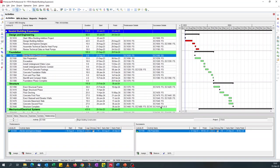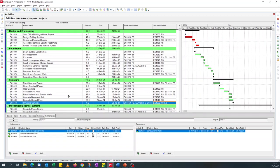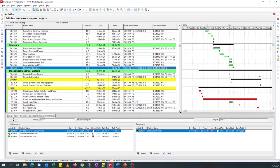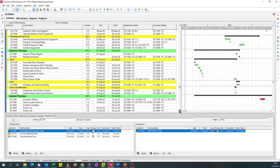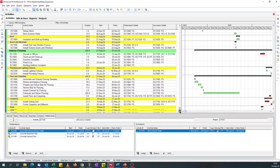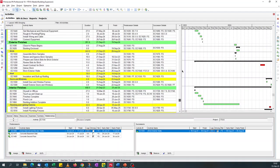You can see this activity — with the successor details field — it's got a six-day lag to the successor. So with the predecessor details and successor details fields we can see the lag details. This gives us a hint that we should use these fields in our filter.